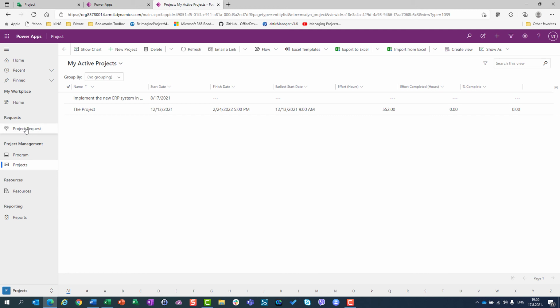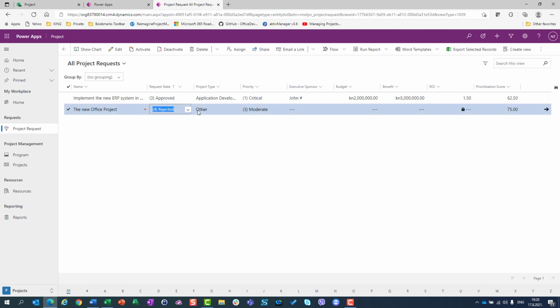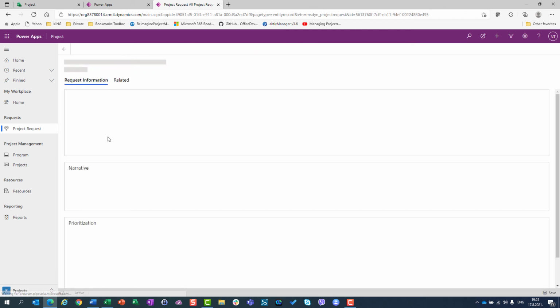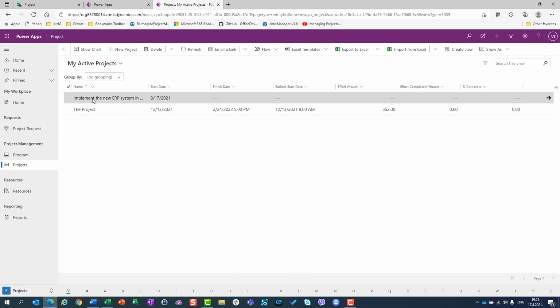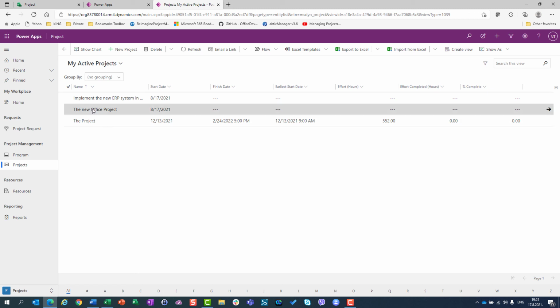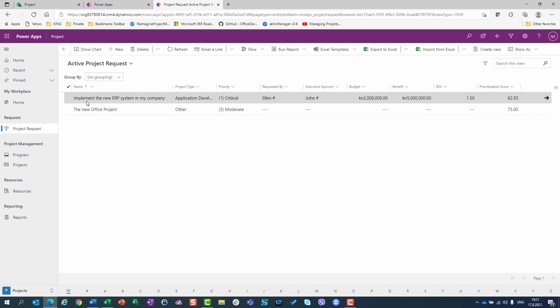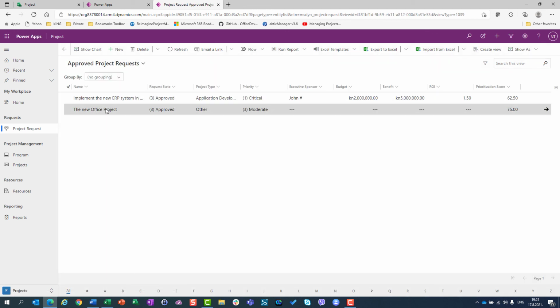You don't believe me? Okay, let's go back to project request. Let's say all project requests. And let's say that I am going to approve this one, the new office project. I am going to approve it. Okay, so it is approved. Edit. If you don't believe me, it is approved. Let's go back here. The project implement new ERP system is shown, but the other is not shown here yet. It will be shown in a few minutes. But if you don't believe me, I will refresh this page. I hope it is now here. Yes, it is. So the new office project and the other project are both here because both project requests are approved. So only approved project requests are going to become projects.